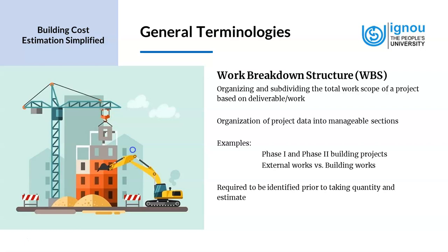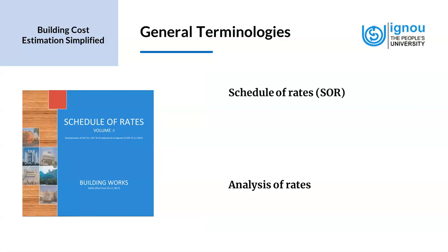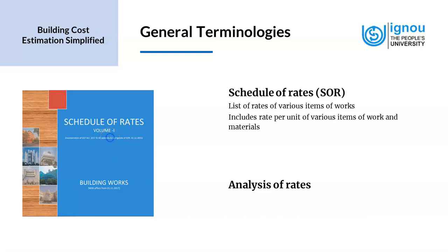Now we come to an important concept of schedule of rates, SOR, and analysis of rates. What is the schedule of rates? It is a list of rates of various items of work. It includes rate per unit of various items of work and material. It has the rates of wages of labor, rates of transport.